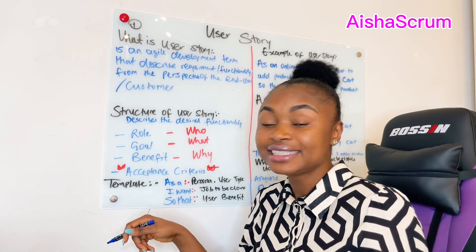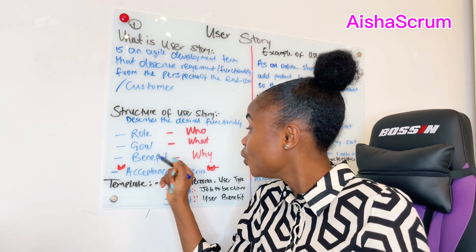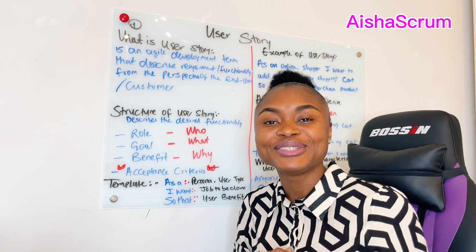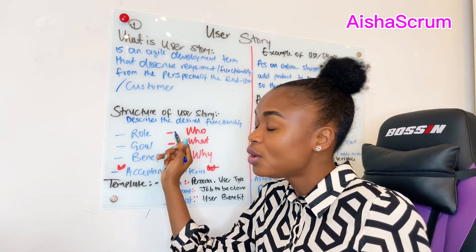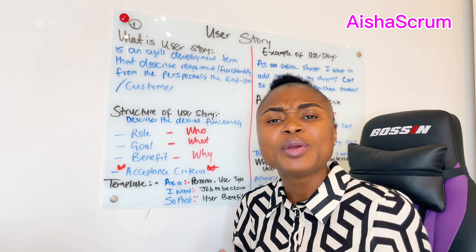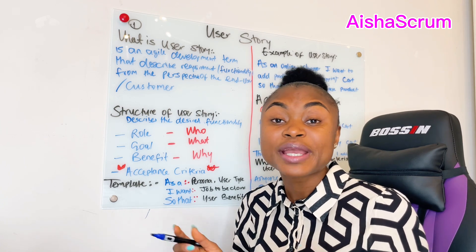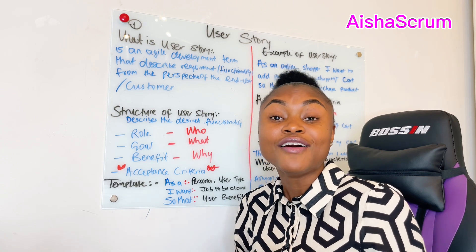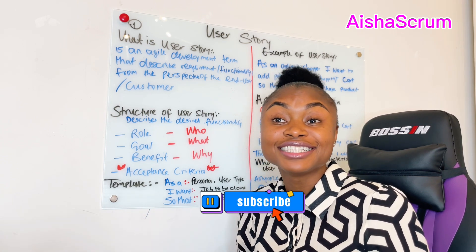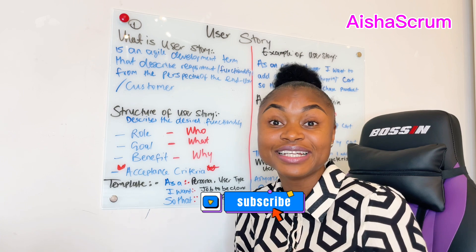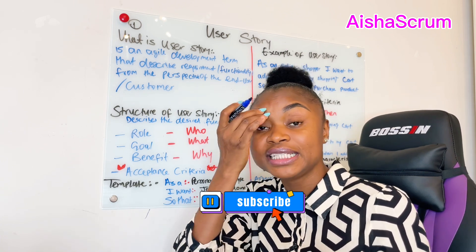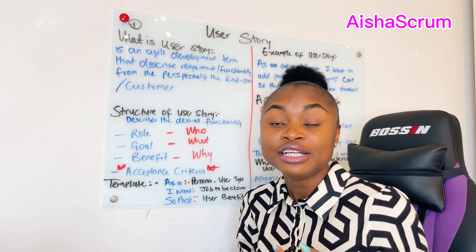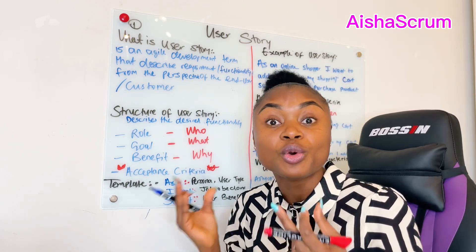This template consists of role, goal, and benefits, and must also have an acceptance criteria. The role basically asks: who are we building this for? This role can be anyone — an online shopper, a business owner, a scrum master, a YouTuber, literally anyone. Any persona that needs this new functionality or desires something. The role is also referred to as the 'who.'